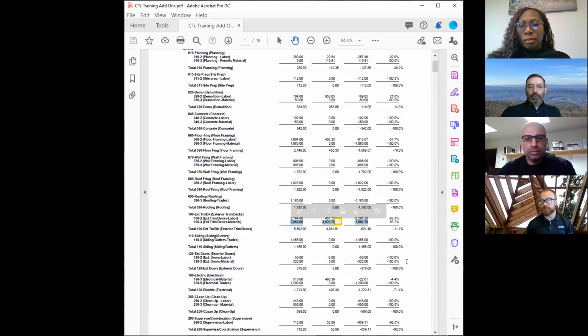And so she's just going back through. She probably went back through, looked at her coding, thought, oh man, I need to adjust some of that, and then moved it around into its appropriate line items. If you'll do a save as here of the cost to complete, and I'll show you one of these in a folder, put your initials at the end, AS, JC, right? Then send Beth a note and say, hey, I made some notes in the job cost. She'll go back and look at those, make the adjustments, and send you a note back. It's real important that you then go back the next month and verify that adjustment was made. Beth is super detailed and thorough, but every now and then she'll miss something, right? So you just want to make sure that error doesn't collect from time to time over and over.